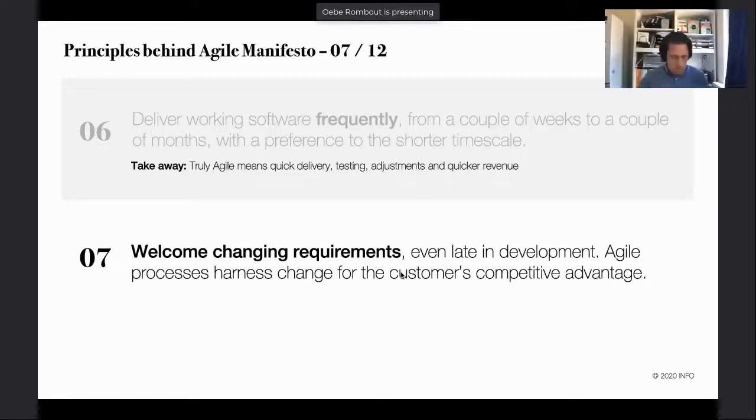It depends a little bit on what kind of project or product you're working on, but the main point is that with a new team, you can be getting to know each other, getting to know the tech stack, getting to know the organization. So then shorter sprints give you way more possibilities to steer, to do retros, to change backlogs around.